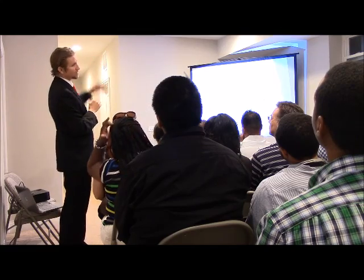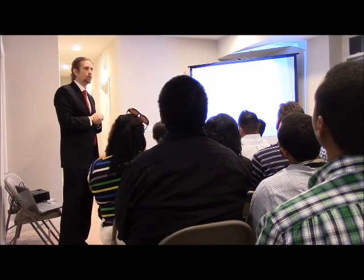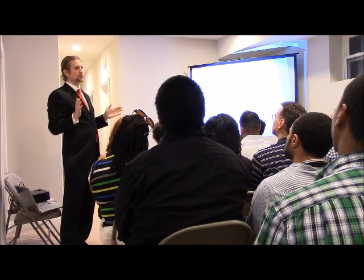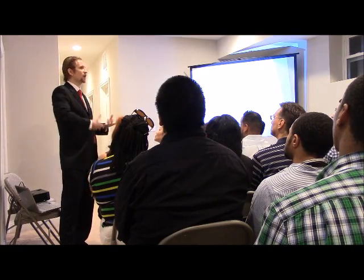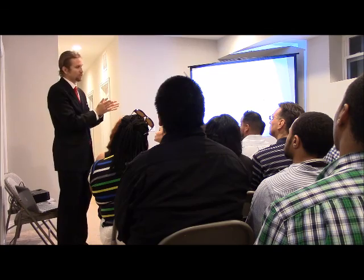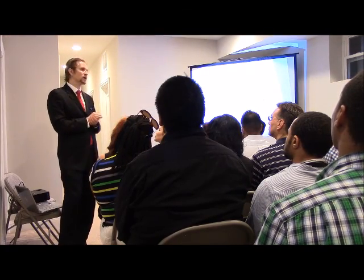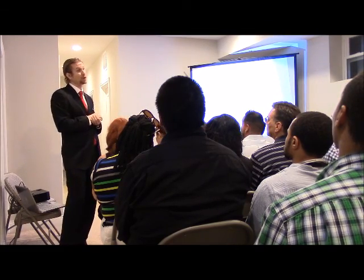Another thing we can do is eliminate that back deck by doing a staircase in the back of the home. Again, these deck inspections, porch inspections are just delays. We can get rid of that. So when you come in, you've got a nice entry, because who wants to climb a deck in the back when you've got a bunch of groceries and there's 2 feet of snow on the ground. So people would prefer to go up steps once they're inside the home in a climate controlled environment. So again, we're eliminating that back deck. And then you can just do a nice stamped concrete or a brick paver, but there's no permits needed for that.